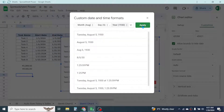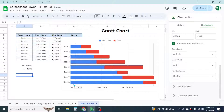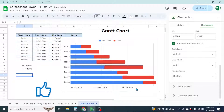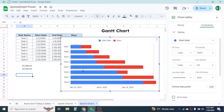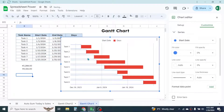Click Apply. Now the dates are displayed on the x-axis in the correct date format. Next, we need to make the start date portion of the chart invisible. Select the start date series, which is shown in blue, then go to the Customize option and set the fill opacity to zero percent. Now that color is no longer visible.